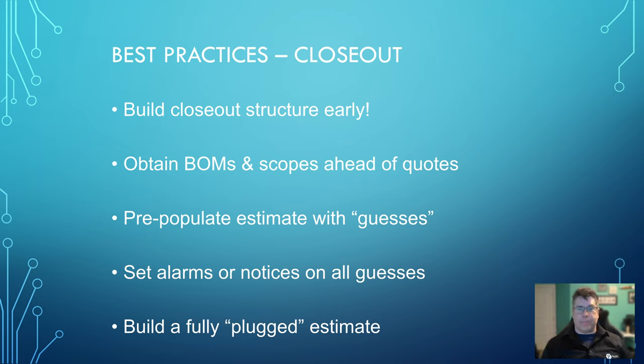You're pretty much never going to get your pricing other than the day of closing on any sort of significant strategic project. If you're in the private sector and things are a little less chaotic, more prescribed, the owner has probably worked with the suppliers already, and things will be pretty much nailed down, then it's nowhere near as big of an issue. But when you're in the major projects, things are held to the very last minute. It is absolutely essential to get your bills of materials and your scope letters ahead of time. Engage with the contractors, subcontractors, engage with the suppliers.